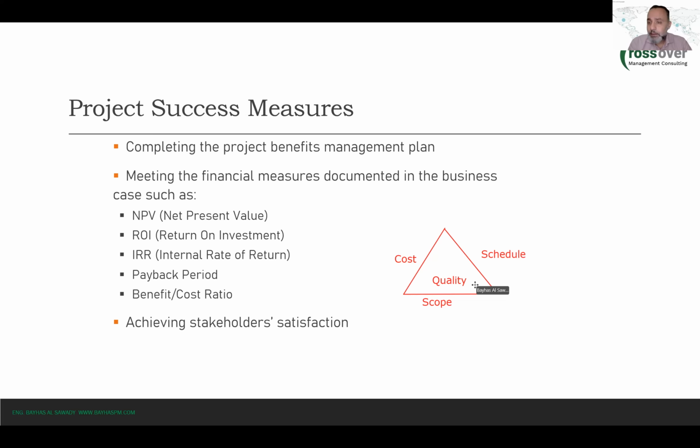I didn't actually hear of that term, project landing. It might be used in a specific context, but what we usually use is to differentiate between the project objective and the business objective. Okay, so the project objective might be to build a tower. The business objective is to create a new revenue stream for the business. Okay. Benefits, expected benefits are, for instance, $1 million every year. See what I mean?